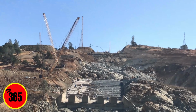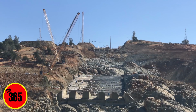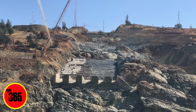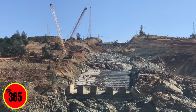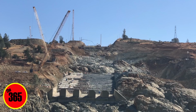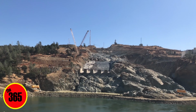They've been demolishing that section. We have some more demolition that's got to continue up there. There'll be some blasts to finish blowing up that upper chute. We're going to take another 240 feet up of the original line that we had. We originally thought we were going to leave about 1,000 feet, but Kiewit and DWR were looking at it, and based on schedule, we effectively can get another 240 feet done this year. So we want to make sure we get that done this year, instead of pushing it off to next year. So you're doing more than what you thought you could. Yeah. So they're gonna begin or continue working up there, and we'll rebuild that upper section of the chute.